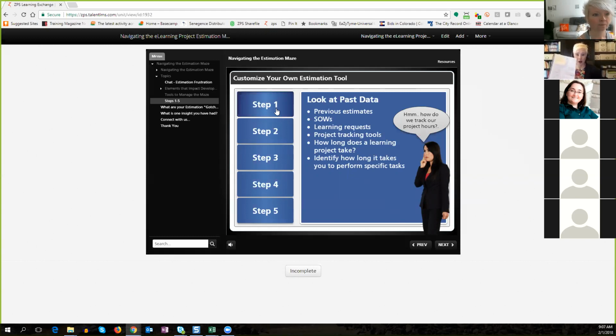Then I take those, and we actually use a time tracking tool that we put all of our hours into, including myself. That way we can look at some data to say, okay, how long did it take you to do that task? How long did it take this person? How long did it take this person? How long did it take me? And then we find rough estimates of how long it takes to do different types of tasks.